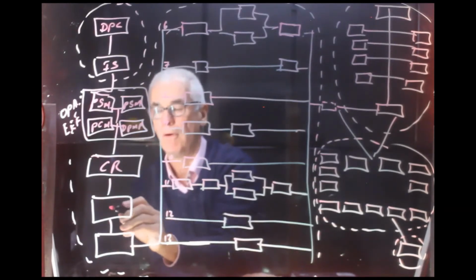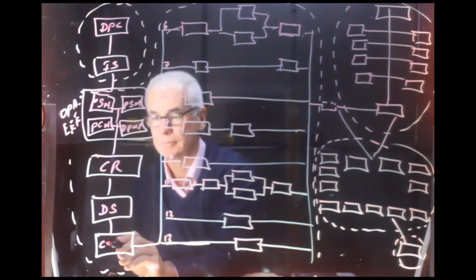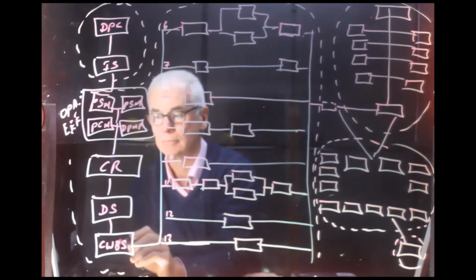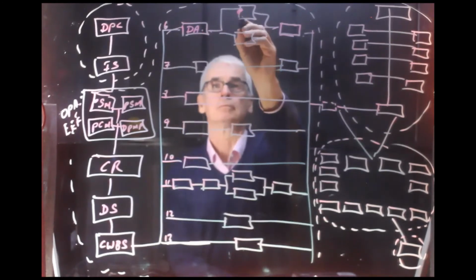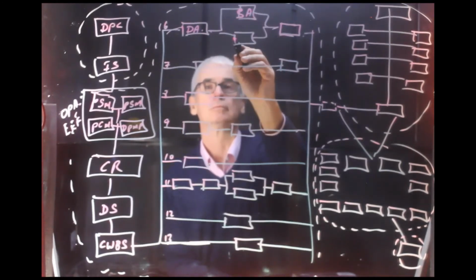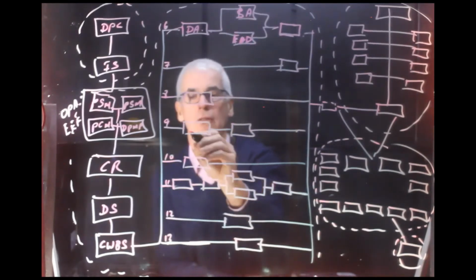And then they're affected by the enterprise environment factors like COVID in this case, but obviously other factors. Oh, and then you can collect the requirements from the stakeholders, and then you can define the scope and create the scope statement, and then create the first baseline, the work breakdown structure. Okay, I see where this is going. Define the activities, and then you can sequence those activities, and then you need to estimate the activity durations independently, I suppose. That's what he's showing here.